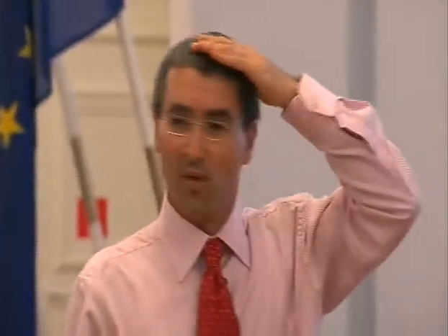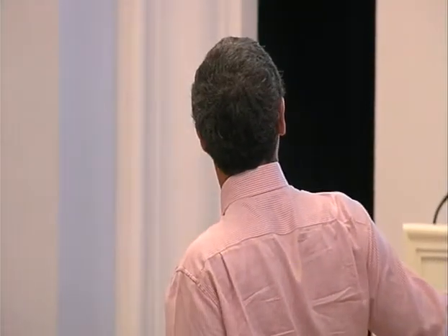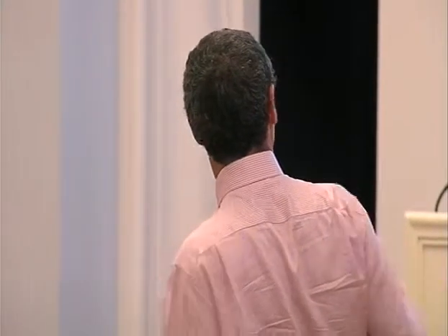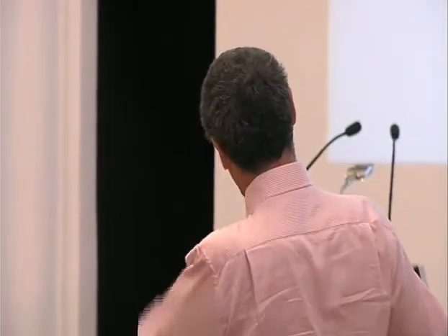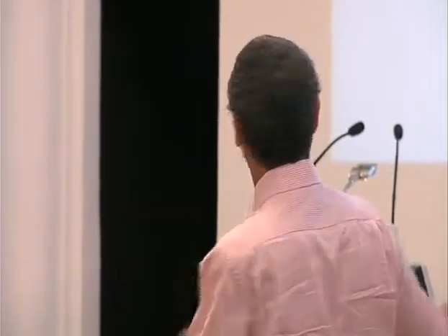I don't have any particular case studies or stories of success or failure, but you can have a look. There is a website of the American Institute of Architects where they have 7 or 8 case studies that people have written up about their experience in doing IPD. And this particular company, Weitz, is a reinforced concrete subcontractor, and yet they have tried to use IPD methods on this project called the Central Park Tower. And they reported, for example, you see here, a previous comparison project a year before, 44 RFIs, requests for information. These are design changes and inconsistencies.